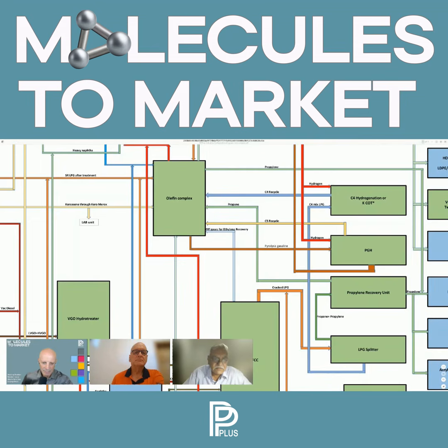They have the freedom to decide on their projects and to invest in their projects. But if it is a very large project, say for example this kind of dream project which we are mentioning, then once they have decided prima facie with the state, they will put up a note to the cabinet committee of the federal government, because the federal government should also approve it. Because ultimately it is a political affair. You are putting up a big refinery, there will be so many products. The government has to see how import and export will work.